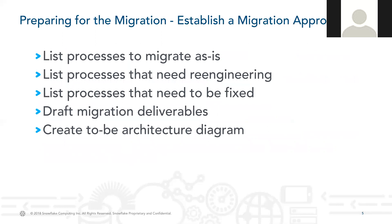Snowflake generally recommends minimal re-engineering for the first iteration unless your current system is truly broken. The more rework that is done, the more development and testing that will be required, which will most likely lead to a longer migration project duration and higher risk. In order to provide maximum value to the business as soon as possible, avoid a single Big Bang deliverable as your migration approach. Instead, break them down into incremental deliverables that enable your organization to start making the transition to Snowflake more quickly.